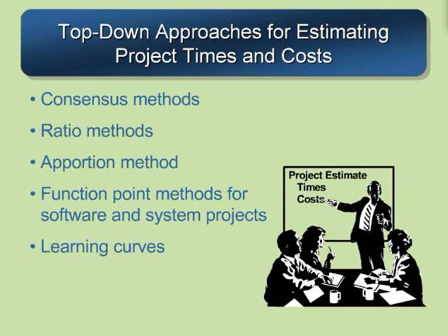We talk to some of the people that have been around for a while, that have worked on some of the projects. Maybe you independently talk to a bunch of people that aren't talking to each other about this, and you get their best estimate for the work involved, and from the high and the low and the midpoint you come to some macro estimate that you can use to move forward.